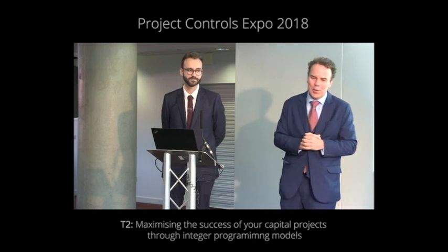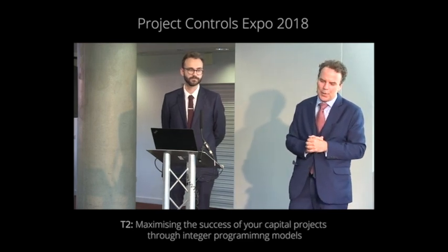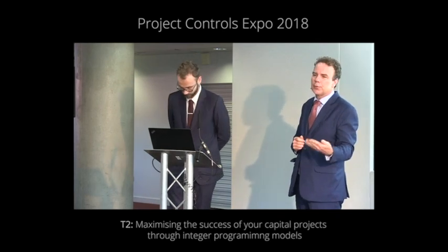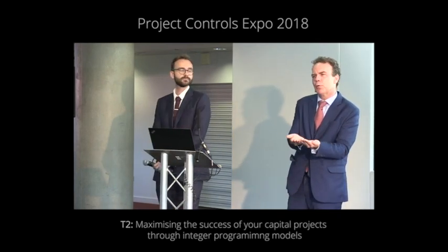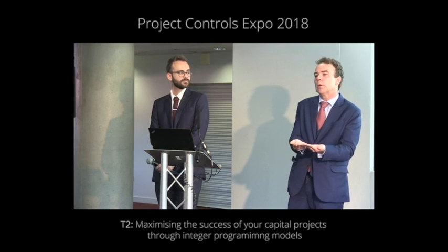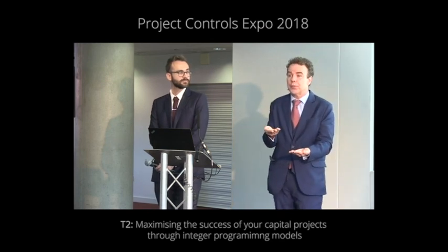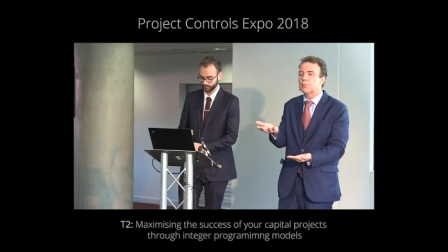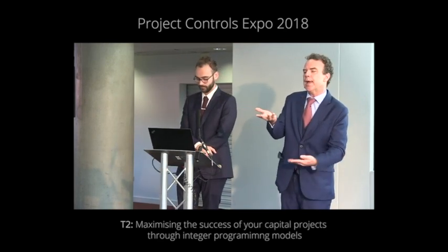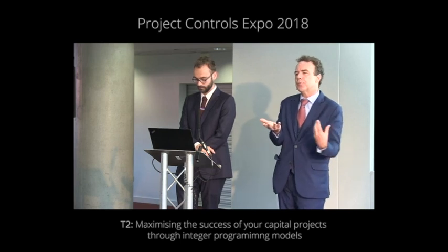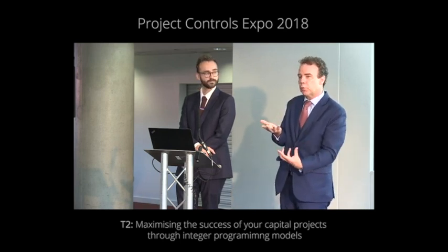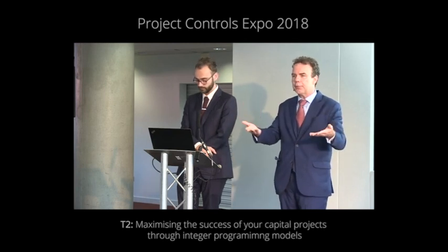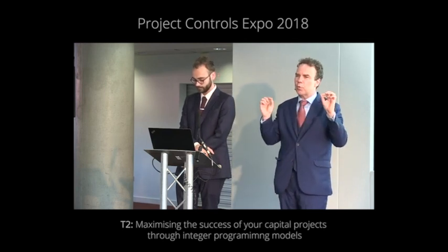So the question is what kind of risks are we talking about? On the one hand, there's construction risk, right? Risks of execution and delivery. But when you're looking at portfolio valuation, what we're really looking for is what is the risk to the business case of the asset in its delivery phase? How well is it going to deliver on its promise? And so the mechanism there is to understand how construction risk for ongoing projects feeds into the risk of the overall business case of the asset and evaluate that at the portfolio level.